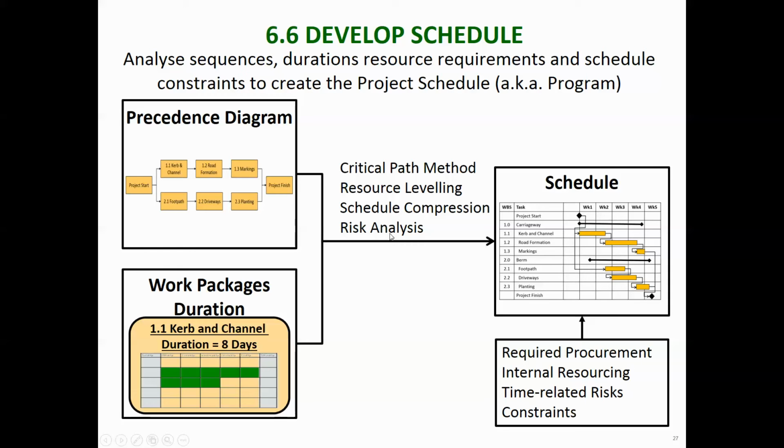You're looking at things, say earthworks, and saying we need to add a few days here for the risk that it might rain, or material deliveries. These might be late. We need to allow some time for that as well.